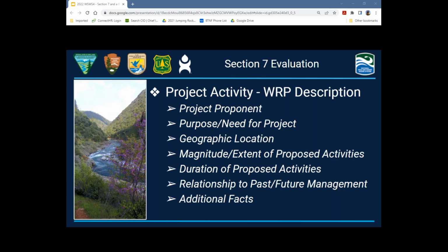If there's no NEPA document, or the proponent does not provide the detailed site-specific information about affected resources, or the proponent does not adequately describe the project design and the construction methods, then the determination will need to be delayed until the information is provided. You know, field work may be required to assemble the data, and you may not have the people to do that. The key is engage early with the project proponent and the federal assisting agency.